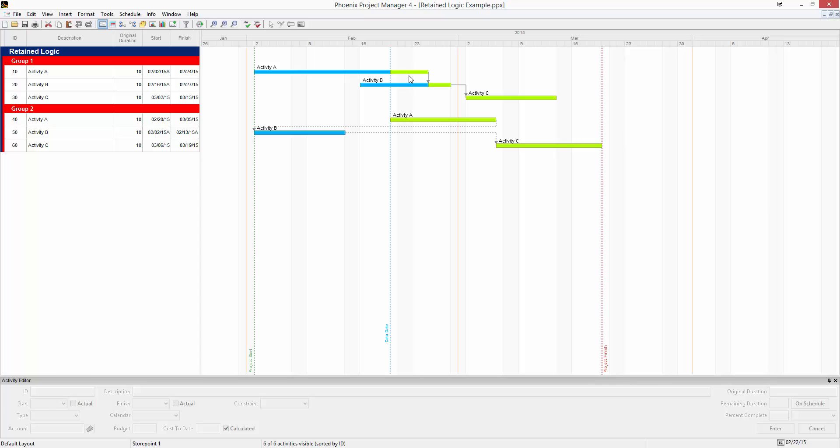You can see in this first group, activity A didn't finish before activity B started. What will happen with retained logic is the remainder of activity A is going to have to finish before the remainder of activity B can continue.